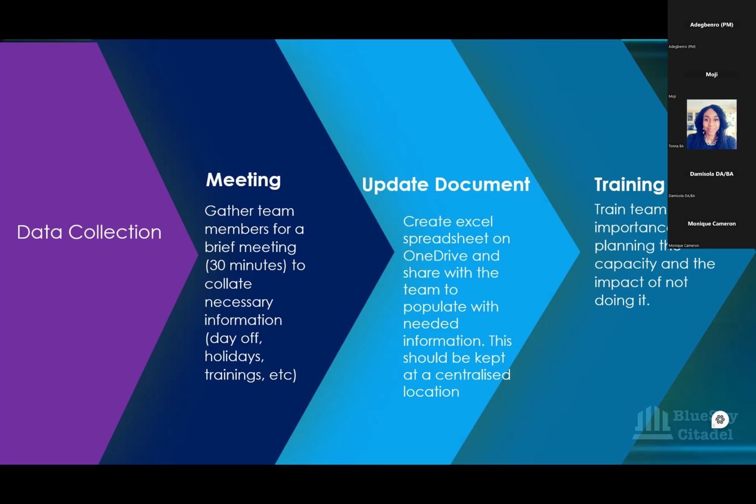The information that you're collating from them is to know what days are you off, what days are you on training, anybody taking holiday, anybody taking a partial day off, anybody taking a full day off. You want to know all that information, and you're recording it somewhere, because that is what you're going to use to plan the capacity, which we will go through with a sample later on, so that we're able to see what we're talking about. So you can use that together.